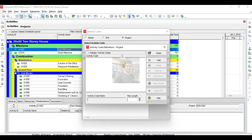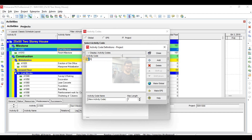First, I want to define a field activity code for my project. I want to show only civil activities, I want to show only MEP activities — how do I do this? And how will I filter my activities according to progress — those activities which are in progress and those which are not started? You can also do it area-wise. On large projects you have to filter area-wise. This is one simple project, only one house of 25 by 50 size, so there's no need to filter it area-wise. I will define the field code.